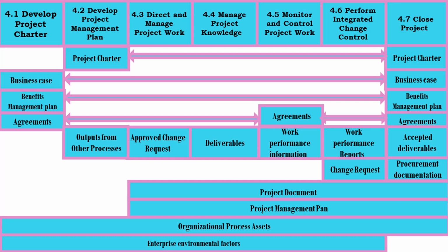the lessons learned repository. The lessons learned repository is an archive of knowledge gained from past projects, which can be used to improve performance of the current project. It is a good resource for companies that have been in business a long period to learn from the problems that happened in the past and apply those lessons learned to the current project. So the project manager needs to improve the utilization of the organizational knowledge base so that he can apply previous project lessons. This can be improved by holding lessons learned meetings, conducting retrospectives, and updating the organizational knowledge base.